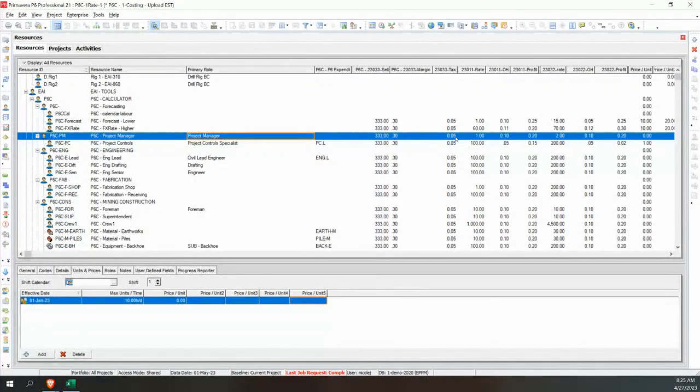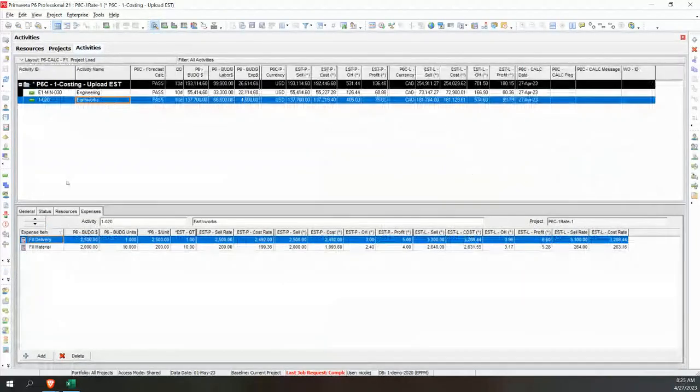So I actually have the potential to also override at this level with a value. So that gives us a lot of nice flexibility in terms of our estimate and how we want to manage the particular costing. Now, if you need to, you could even have an override down on the actual resource as well. Okay, so you can have an override on the particular rate on a particular activity. So if you need that flexibility, perhaps you get a change order and you want to have a higher rate. For sure, that can happen.